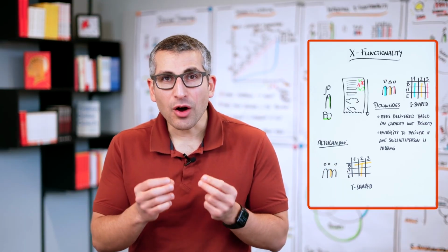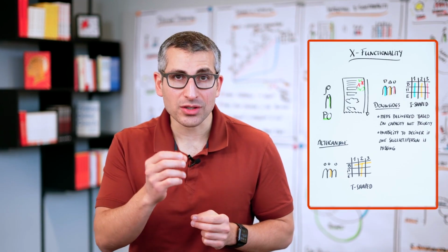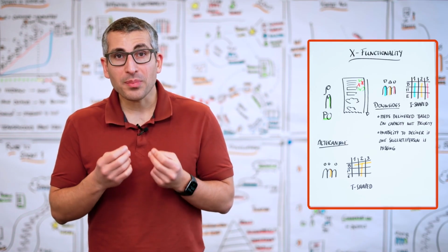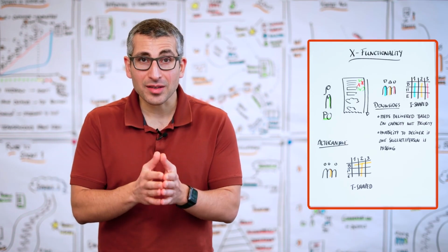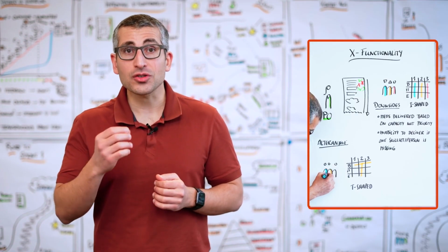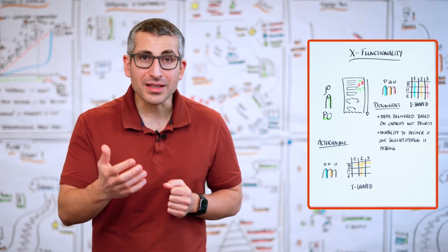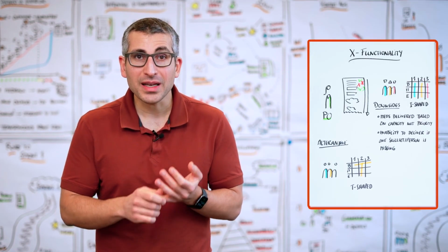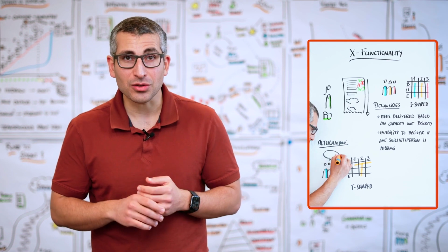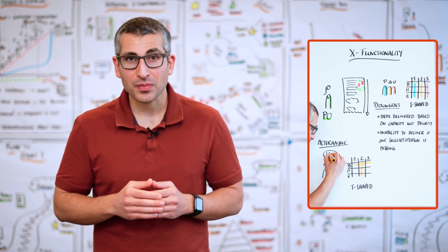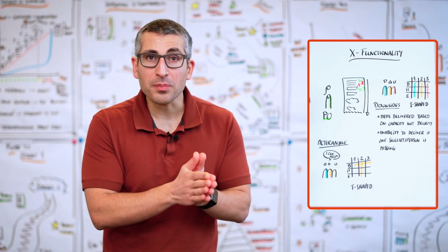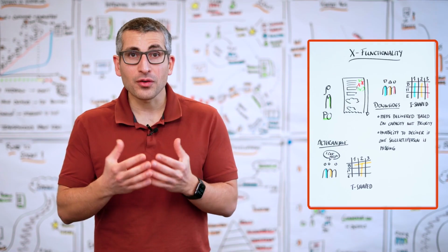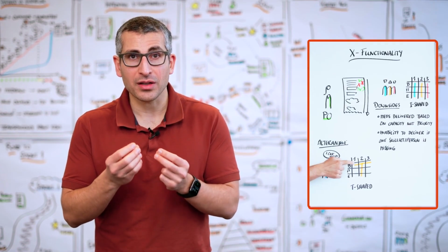Now let's look at how this changes the equation, how this changes the challenges that we were facing in the first scenario. When our blue team member complains that they cannot deliver an item because the first item already takes a certain percentage of their capacity, this time the orange team member could say, I can help you. I might not be as good at it and maybe not as fast as you, but still I can be of help. And maybe you can focus on the pieces that really require the deepest level of your expertise, whereas I focus on the things which only require basic level understanding.